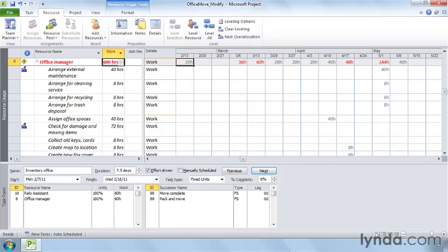If the resource is over-allocated at all, the text in the Summary row is red and bold, and the yellow diamond with an exclamation point appears in the Indicators column. The time phase grid on the right shows hours assigned during each time period. If the hours are higher than the resource's maximum available time, the hours appear in red too. Unfortunately, if several tasks contribute to the over-allocation, the hours in the Summary row are red, but the hours in the assignment rows aren't.